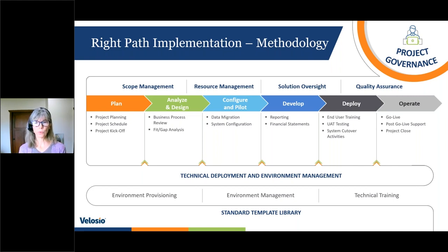In the perfect world, the system cutover activities might start on a Thursday afternoon. And Friday would be spent from your team loading that final data, our team doing the final configurations, making sure everything in that live company is set up correctly, so that on Monday, your end users are now set up to say, okay, BC is our new ERP system. This is where you're going to do things.